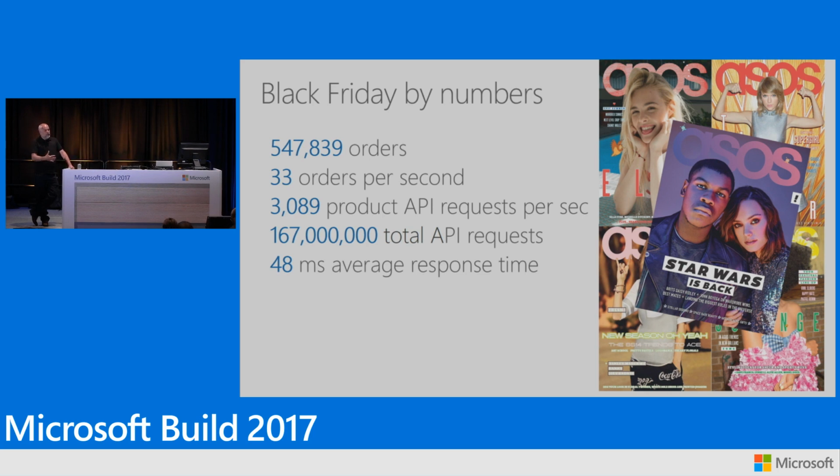The platform lead's job, with a product manager, is to figure out the balance of resources going into developing Apple Pay versus resilience versus looking at production issues and doing something about them. How we do it is quarterly: you go ask for money against a set of KPIs, and your job as the platform lead, with the solution architect who's in your gang and the product manager, is to set out a case for money for a period and balance those things out.